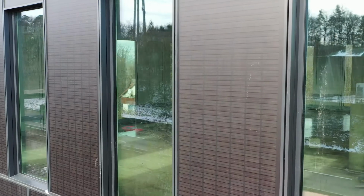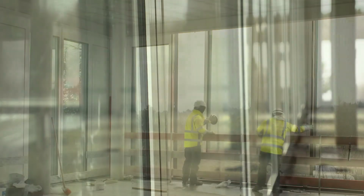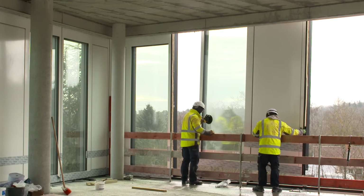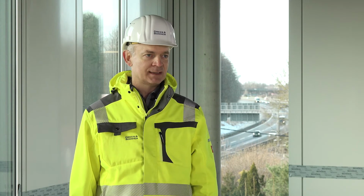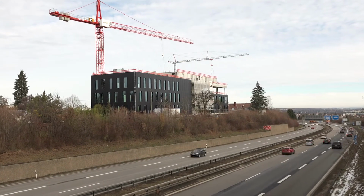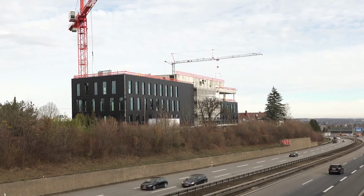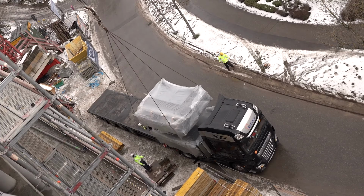Also, the facade weight plays a very important role. If we're dealing with a 90mm build-up or 210mm including photovoltaic panels, the elements can of course be engineered with a larger mullion grid. Furthermore, these will be very easy to transport and to install, and therefore you're much faster on construction sites. In this building, we can install the entire element facade you see here in just under 2.5 weeks. This is clearly a huge advantage where speed of construction is a concern, in particular in urban locations.